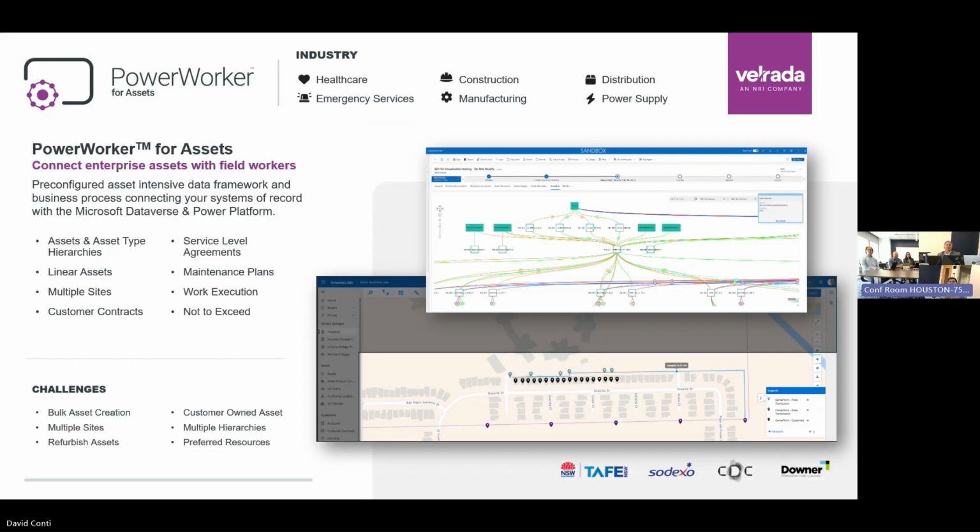So really we're trying to help you work through that full process, being able to visualize the flow of information, understanding where you've got a linear asset, a flow where you take one element out in your actual process flow, well, the whole thing stops. So being able to manage your scheduling and your maintenance based on the impact of that maintenance is very important. If I talk about a pipeline that starts with a well through to a production plant, if I take out one piece of the pipeline, the whole thing stops.